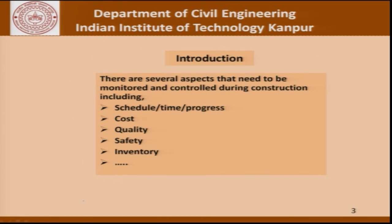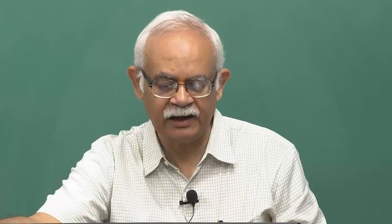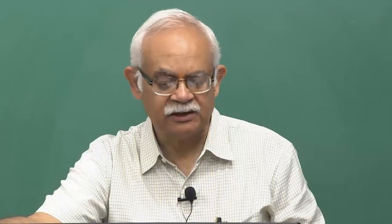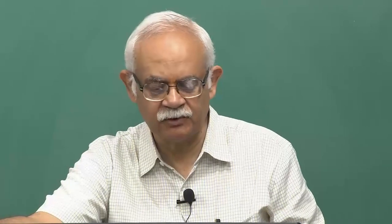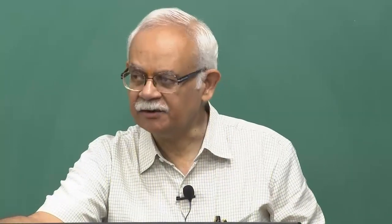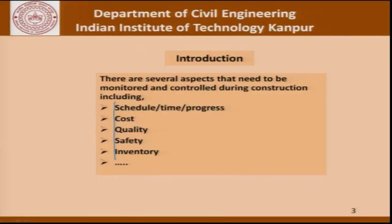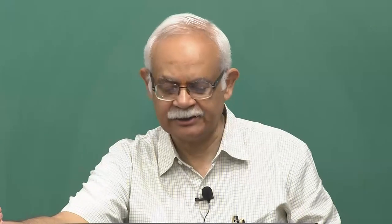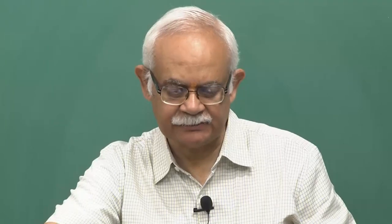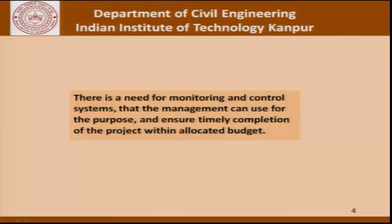All these aspects require plans. If you recall from the planning class, we said that plans need to be drawn up for all these items — the schedule, time, progress, manpower deployment, cost, cash flow, quality plan, safety plan, inventory plan, and so on. It is not only required that the plan be there, but also whether that plan needs any mid-course correction. Today's focus is on those aspects of mid-course correction as far as time schedules are concerned, to ensure timely completion of the project within the allocated budget.